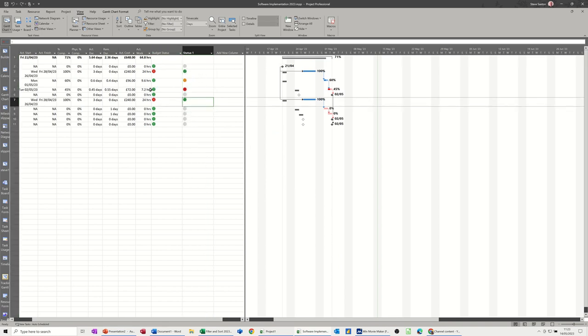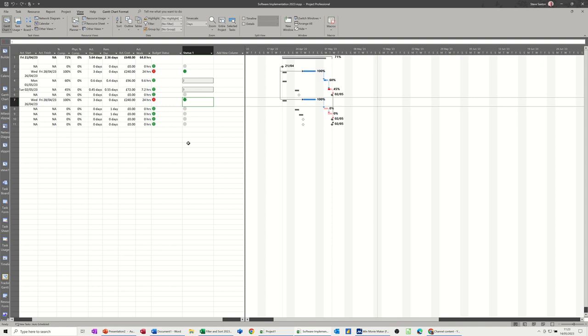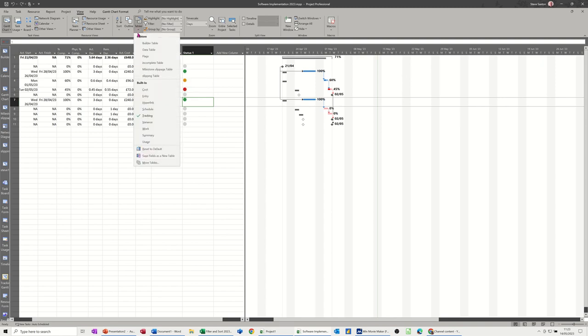You've got one indicator telling you whether you're over budget or not, and then you've got another indicator telling you where the project's complete, started, pending, or whatever it's doing. You can just see the numbers when you hover over it. But you're now customizing this tracking table. What I perhaps should have done is save this table. So when you go to View Tables, you can save these fields as a new table, so it's not going to destroy the actual structure of the tracking table. So you've always got the chance to come back to the tracking table defaults.